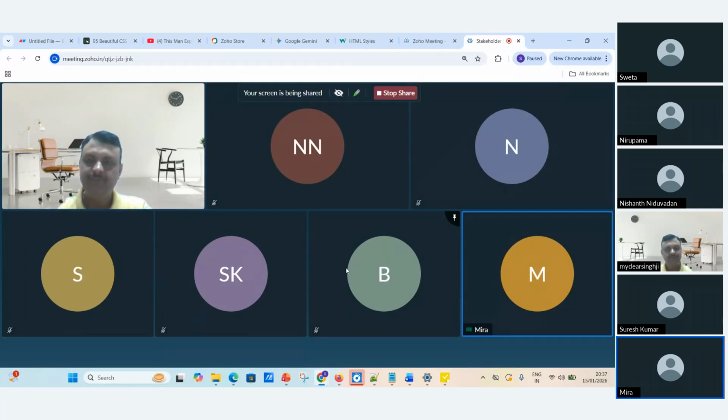So my own approach would be to get a one-on-one with the stakeholders, and try to find out the cause of their conflict. And once I get a grasp of what the conflict is about, I'll go ahead and schedule a general call with the stakeholders, with any other party that is concerned in the conflict, and we go from there and have a discussion, really trying to focus on the goal and not taking sides between the stakeholders.